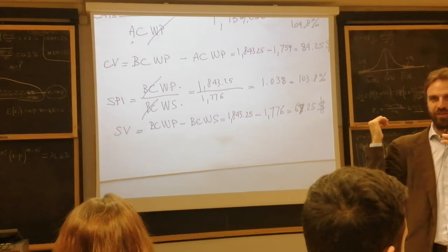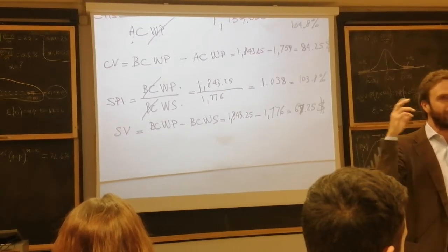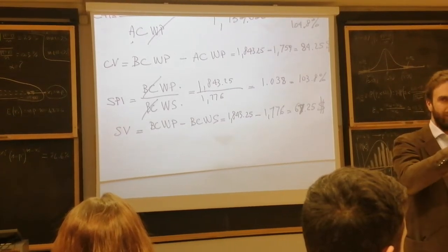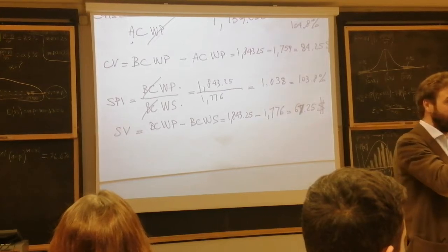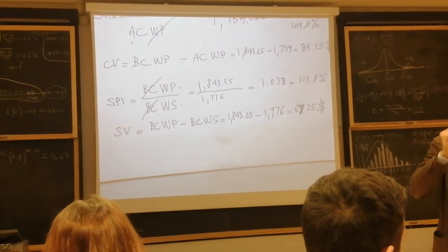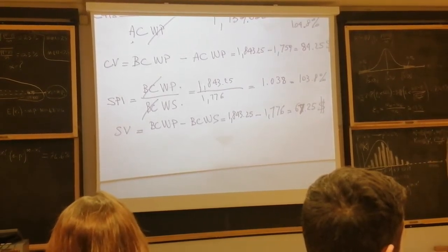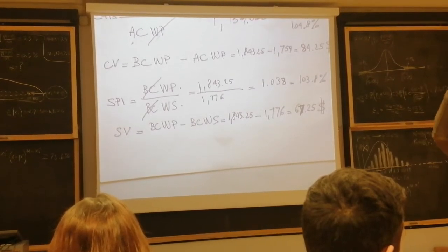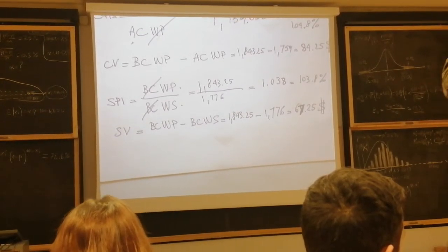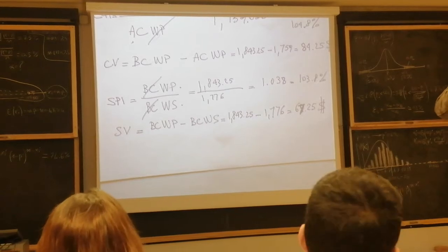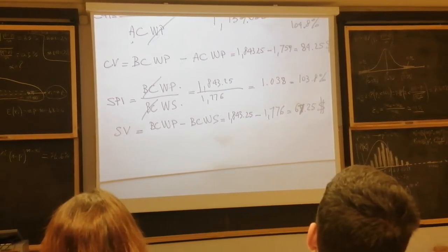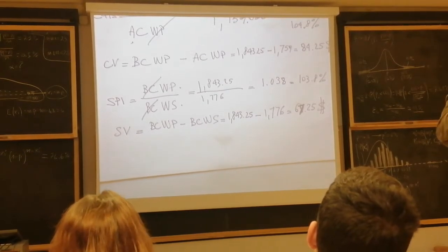It looks like the project is saving time, and you could make it in a shorter deadline, 3.8% less time. But in fact, no, because both Ismail and Faith could understand that you need to look into the Gantt chart. Because maybe one task is going longer and another one is making savings. So in total, it looks like that.